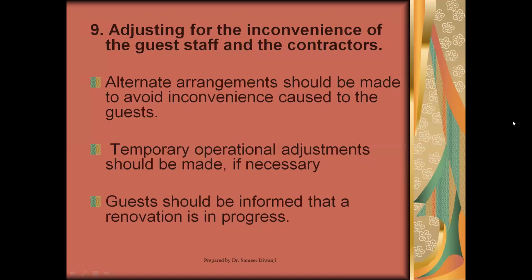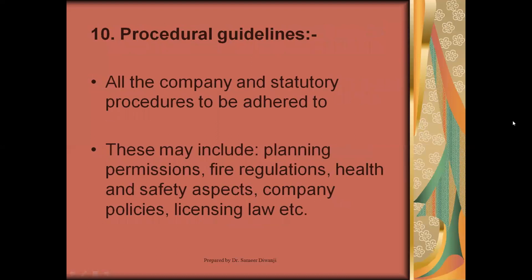Temporary operational adjustments also. I remember once a coffee shop or an all-day diner, as we call it, was up for renovation. So we had converted a banquet hall to the breakfast buffet coffee shop. So guests have to be informed. You also have to follow discipline in that. If it's noisy work, it can be only done during the day when it's least bothersome to the guests.